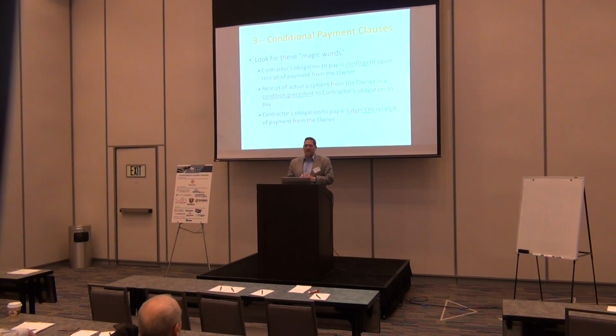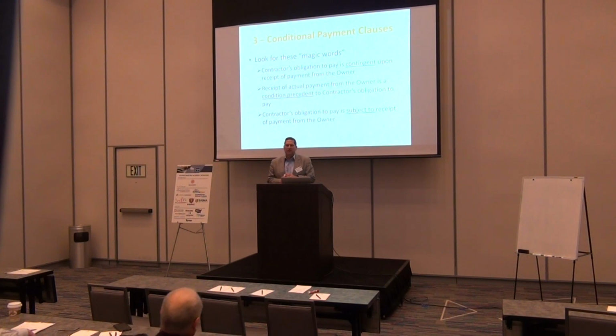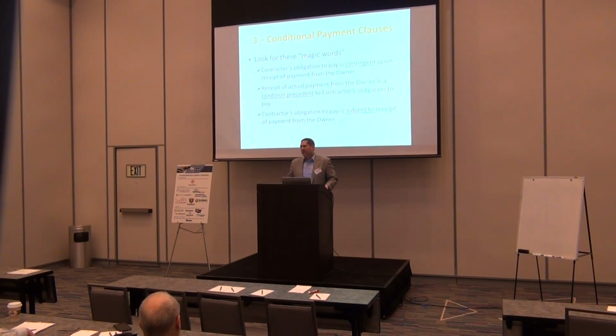For those of you around this area, the corporate parking project, that's what happened. The original developer went out of business, and there were subcontractors who didn't get paid. The contracts had pay if paid provisions, and the judge enforced those and let them file a mechanics lien, and then they fought over who had rights: the mechanics lien claimants, the lender, which was Bank of America, and then there was the bond. So yeah, that was one of the reasons why my kids got to go to college too.